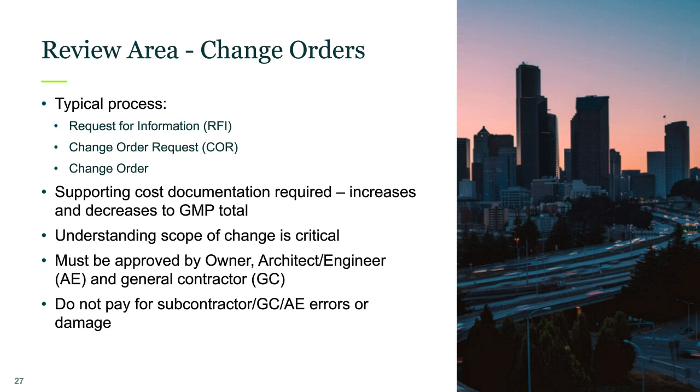And a common thing that we see is, be on the lookout for general condition charges if the schedule hasn't changed. So let's say the project was going to take a year, there's no change to the schedule, and they do a change order and they include a project management cost to it. That person was already fully booked for that year, so you could say that it's already included within the original budget, not allowable. Also be on the lookout for errors or damages and/or non-compliant or excessive fee markups.